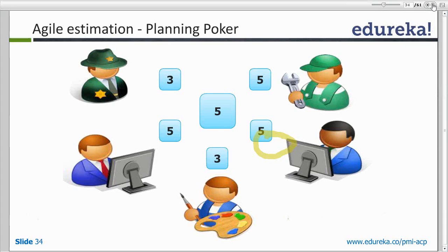Right. And why would we need the Scrum Master? He knows the processes of agile, so he would guide the team. He would not let them deviate from agile. So each team member is given a complete deck, with all the cards with numbers 1, 2, 3, 5, 8, 13 and so on. And on a big screen, the Scrum Master would have all the requirements listed in priority.